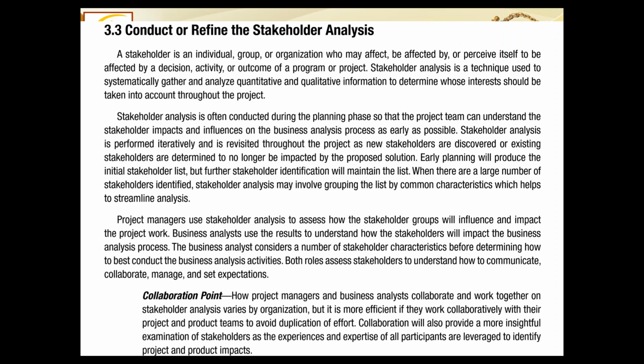You can not only exclude unnecessary stakeholders, but you can add new stakeholders. And also, if some stakeholders remain stakeholders but change their values, our behavior and attitude to deal with them should accordingly change. If a stakeholder initially was showing less interest and I was just informing him about what is happening, now he has become very interested. So it is not only a matter of information, I rather have to get him on board, involved with my planning work. So this all depends upon what kind of stakeholder it is and how I should behave with him. That behavior which I predict to be needed with the stakeholders is to be determined in the stakeholder analysis, and that is usually called the stakeholder management strategy.